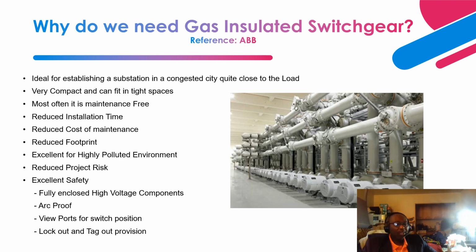Next, let's talk about the reduced installation time, right? This comes into play during construction. During construction, you are doing your best to reduce construction time to meet due dates and also to be able to complete the projects on time. The gas insulated switchgears come in modules, already assembled in the factory, which makes installation time much faster. So you are able to achieve a reduced installation time.